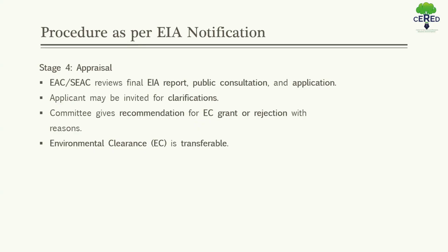The applicant shall be invited to furnish necessary clarification in person to the appraisal committee. On completion of the proceedings, the expert appraisal committee shall make categorical recommendations, especially for grant of prior EC, with reasons. And then the EC is granted or rejected. These are the main procedures of EIA.